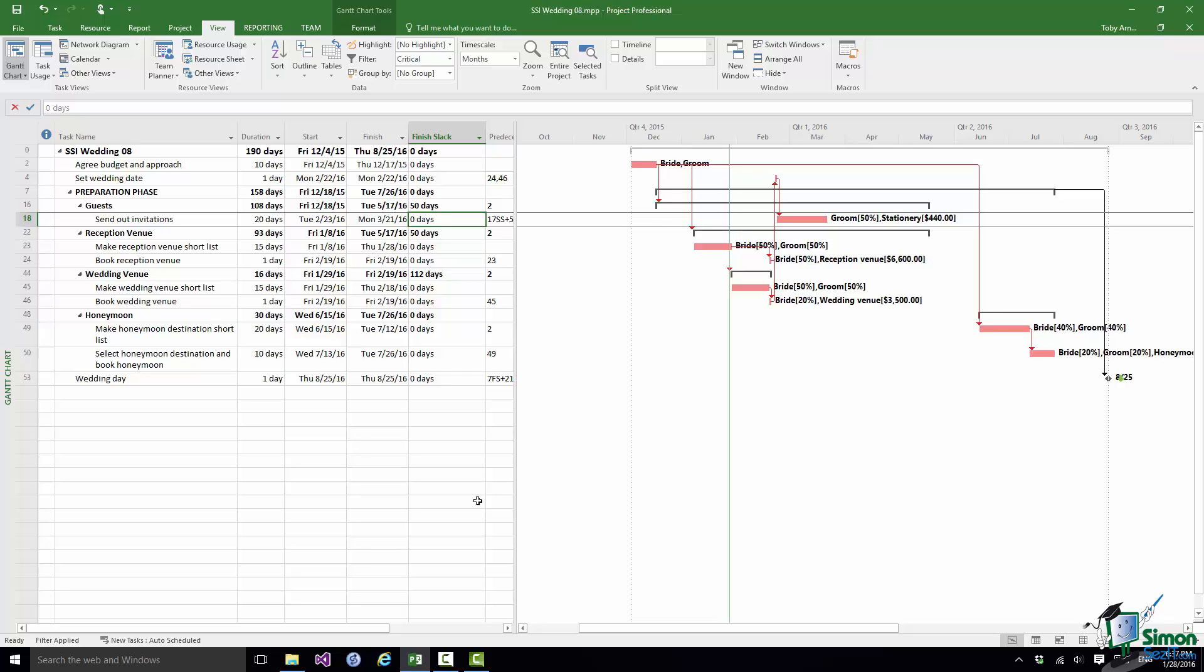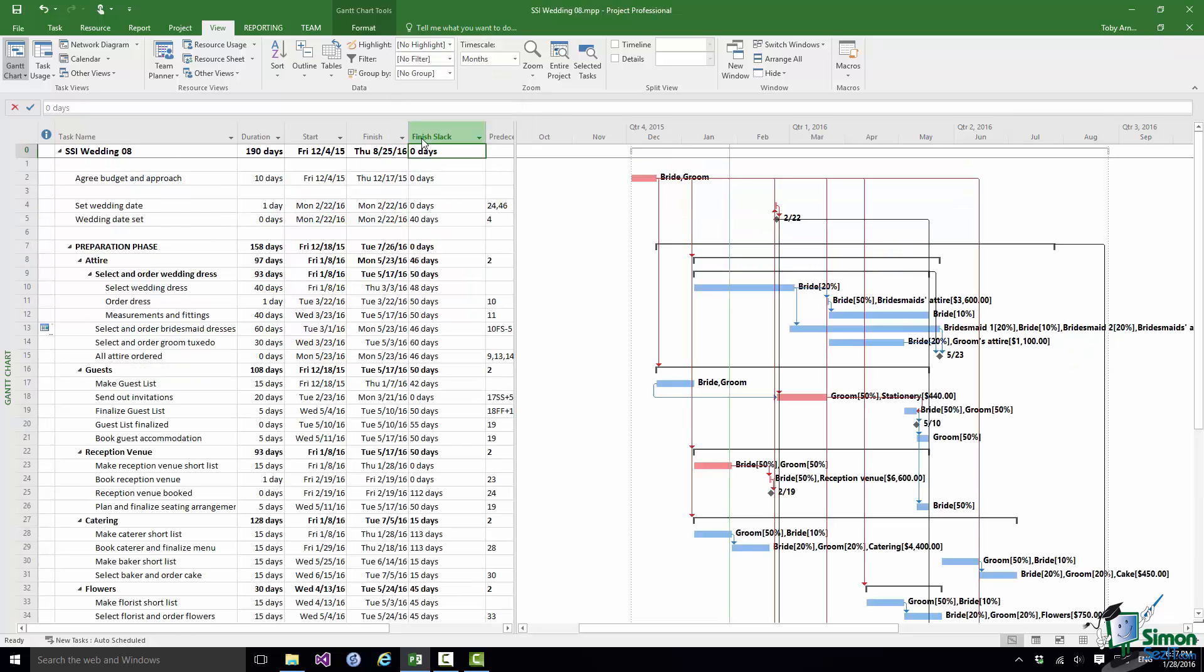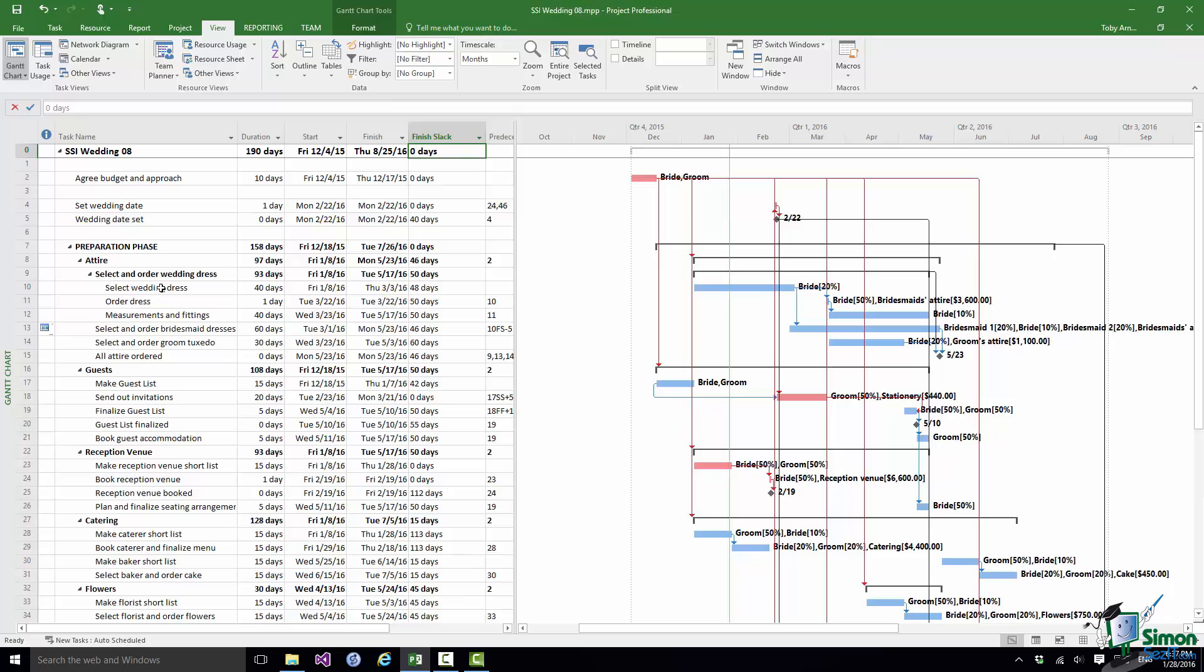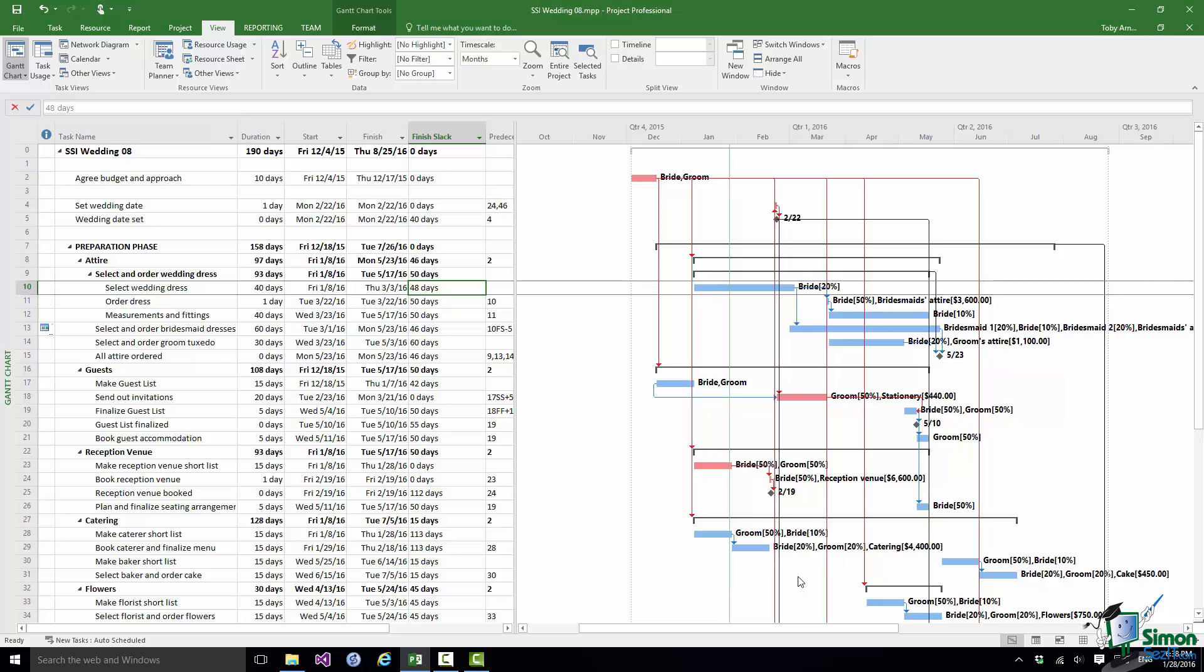Now let me remove that critical filter and let's look at the Finish Slack on all tasks. Now if you look at something like Select Wedding Dress that's got 48 days of Finish Slack. So that could be 48 days late. Bear in mind various other tasks follow on after that. But it could be 48 days late without affecting the finish date of the whole project. And if you look down at all of the other tasks in the schedule you'll see that all of the non-critical tasks have in many cases a significant amount of Finish Slack.